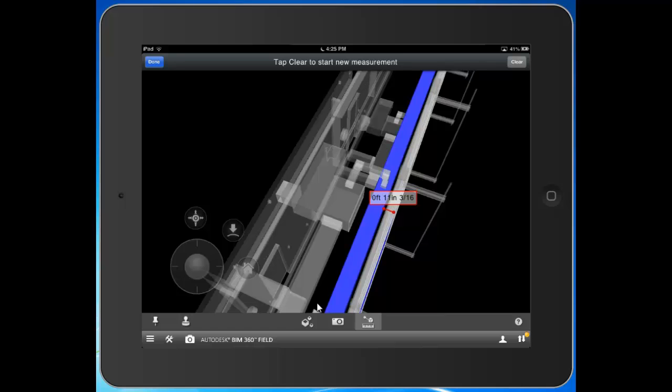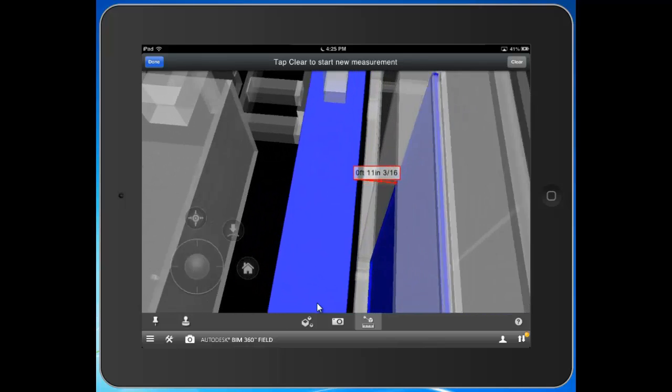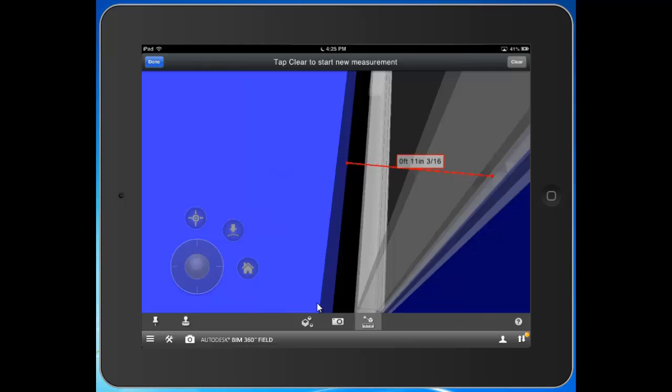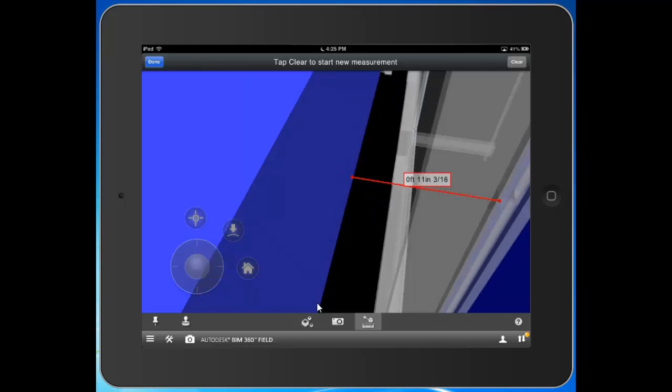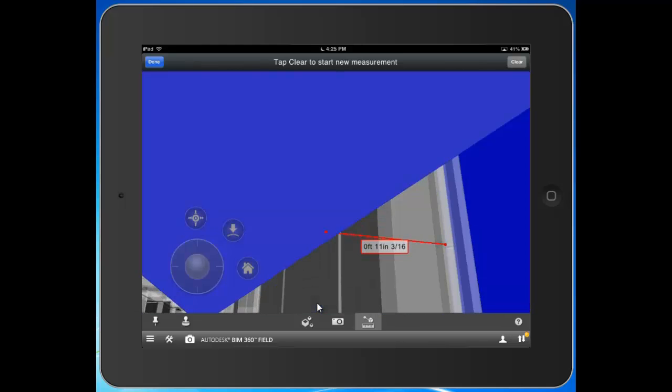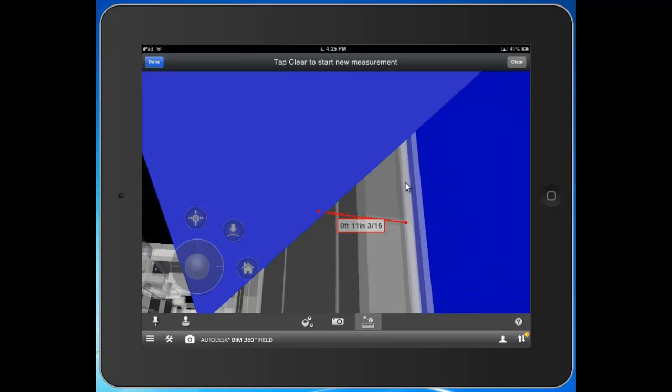So, pretty powerful. At the end of the day, what you're looking at here in the model is the design intent. So, this is what was supposed to be built. What is this actual dimension? Is it more? Is it less? This might call for a change order. So, we can clearly see what the design intent was. Maybe it's not being executed on. Good information to have at your fingertips in the field at the point of construction.